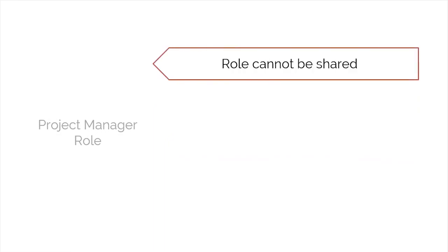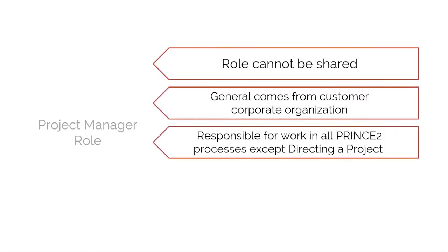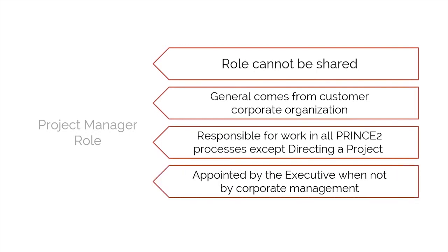Now, let's discuss the role of a project manager. In a PRINCE2 environment, the project manager's role is not shared. The project manager generally comes from the customer corporate organization and is responsible for the work of all PRINCE2 processes except directing a project. Now, the project manager can take on the role of a team manager if required. In the absence of a separate person or group performing a project support role, it defaults to the project manager. If a project manager is not appointed by the corporate or program management during the pre-project starting up a project process, the project manager would be appointed by the executive.